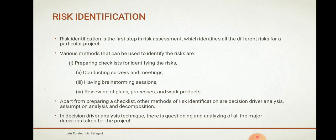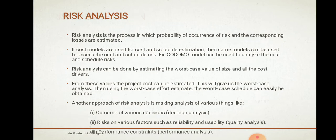One such technique is decision driver analysis. In this technique, we question and analyze all the major decisions taken during the project. Based on this, we can identify the risk. After this, we can analyze the risk.